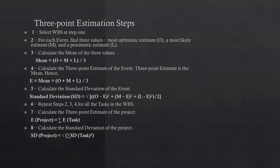In step 5, calculate the standard deviation of the task or event. SD equals square root of [(O - E)² + (M - E)² + (L - E)²] / 2.